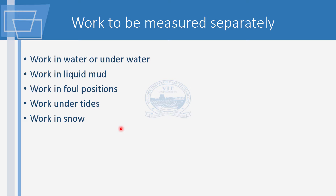Work done in water or underwater is dealt with separately. If you work underwater, you must compulsorily dewater before any concreting. In a dry area, an ordinary pump suffices. But if you are working near a lake or river where the water table is extremely high, the moment you start digging, water fills the gap immediately. In such cases, separate wells are drilled around the site and water is pumped from dewatering points. The cost proportionally goes up. When making your bill, the first thing is to measure the work, and payment should be in proportion to the work executed.